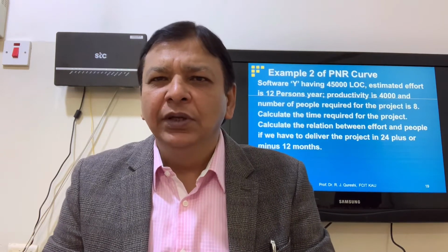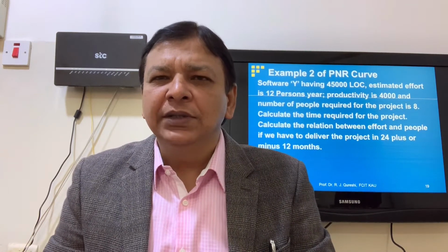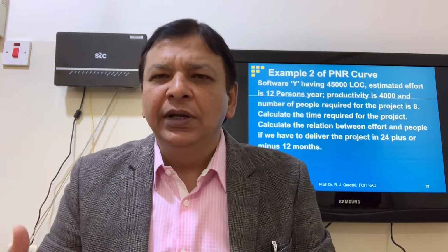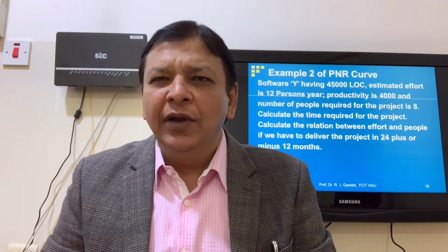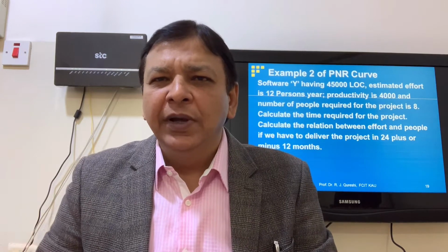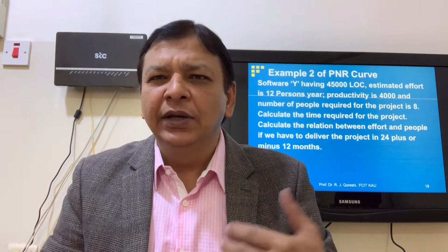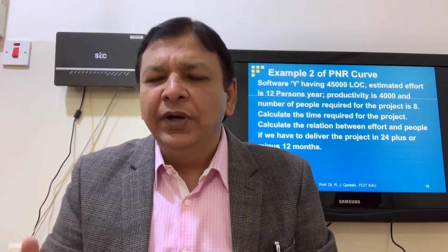I was covering the PNR curve in my last lecture, the Putnam-Norden Rayleigh curve. As per the Putnam-Norden Rayleigh curve, there is a relation between effort and delivery time: by increasing the effort, we can decrease the time, or by decreasing the effort, we can increase the time. We have discussed one example.